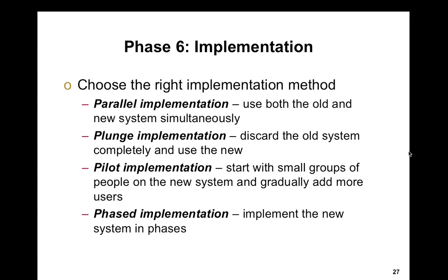In a pilot implementation, you start with a small group of people in the organization, maybe the less critical ones, and you swap them out. Because if they can't access it, who cares? So you're working in a bank, let's say, and it's a teller system that's being used by everybody. Mostly the teller features are used by the tellers, and the investment bankers are using other features of the system.